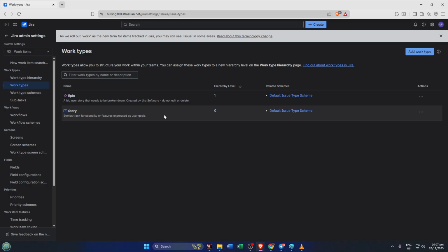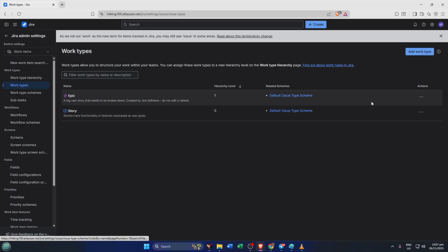When you're viewing the screen layout for your stories, scan for either a field named Story Points or sometimes it's called Story Points Estimate. If you don't see it there, don't stress. This is a common thing and it just means you need to reach out to your Jira administrator, the person who can change screen schemes for your project. They'll be able to add story points to your screen layout, and once that's done, you're ready to assign estimates.